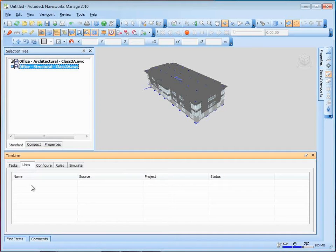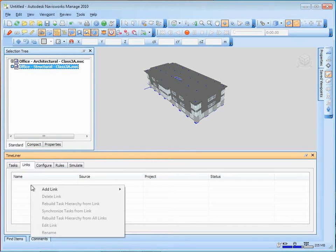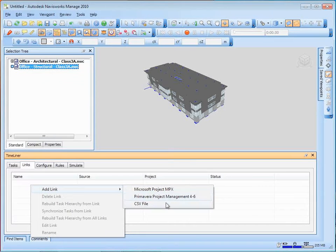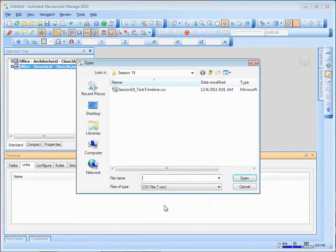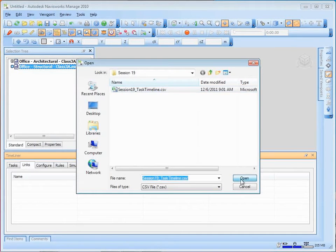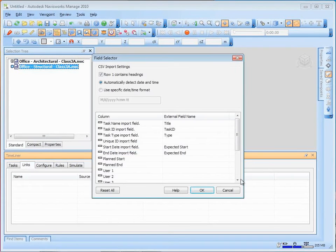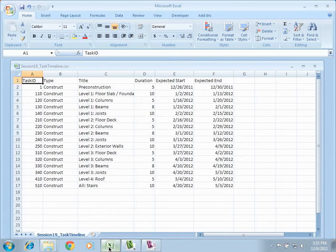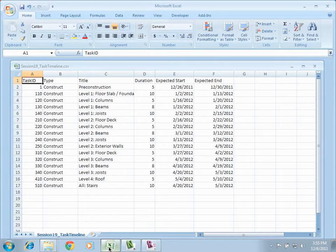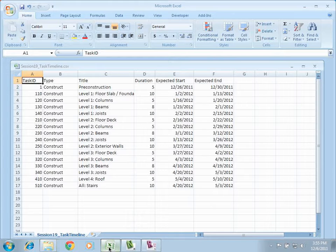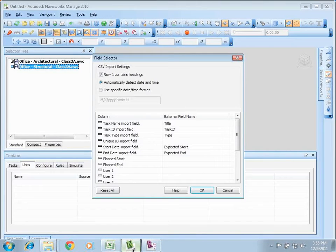So if I go to link and I say add a link, I have the choice of bringing in a Microsoft project file, a Primavera file, or a CSV file. I'll choose CSV. Then I'll go out and grab my little task timeline. Now, if you bring in a CSV file, since your CSV can really be almost any Excel file, we need to give the program just a little bit of help about understanding how the information in your columns maps into what it expects in its columns. So it's going to grab the information up here, task ID, type, title, duration, and the column names that you used, and you're going to map it into sort of its versions of what those things should be. So let's switch back over to Navisworks and show you what I mean.